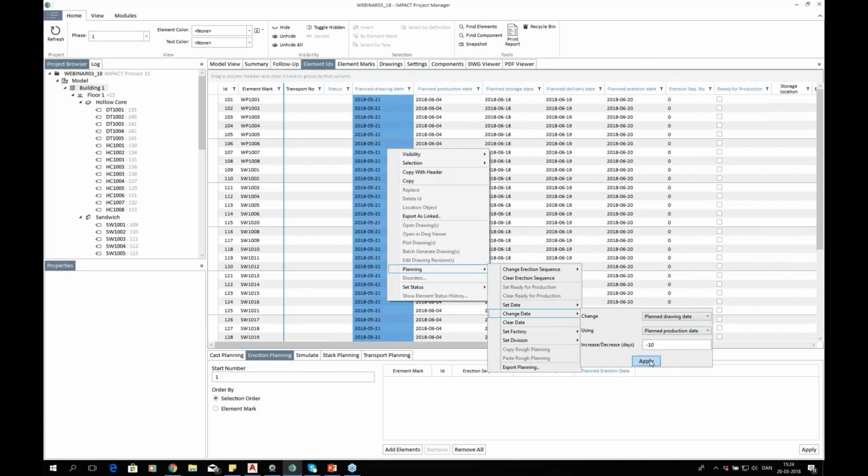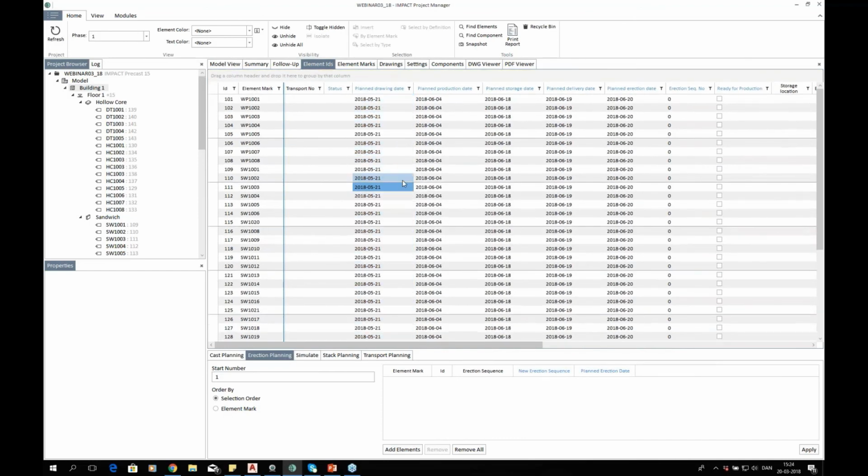I know that this is probably not like the real world, where it often is that we have a production make sheet or a production drawing finished 2 minutes before we cast it. But in this ideal world, we want it to be finished 2 working weeks before. So we have time to plan everything nice and easy.